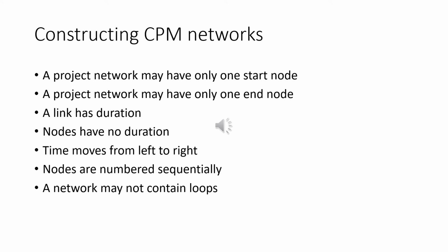The logic suggests that program testing cannot start until errors have been corrected. A loop represents an impossible sequence. It represents an error.